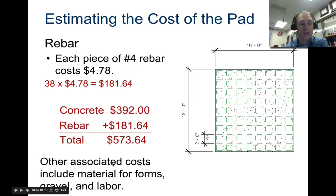There's other materials that you're going to actually calculate, which are forms that you're going to use. The forms - you would put a board on each side to make a border so that the concrete doesn't just spill out. You can't buy forms in 18 foot lengths, but you could buy a 20 foot board. You can buy a 16 foot board. My question for you though is, is an 18 and a 16 foot exactly what you need? And I want you to think about how you would nail these things together. If you have an 18 foot board and a 16 foot board, you're going to end up with this gap in the corner. So there's nothing to nail into on either side. So one of these edges has to be longer by an inch and a half on this side and an inch and a half on this side. So 18 foot 3 inches would work because that would overlap the outside edge of the 16 foot board.